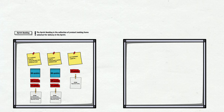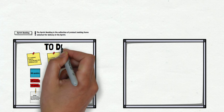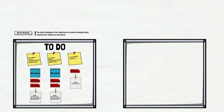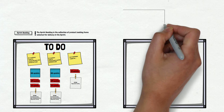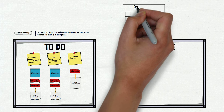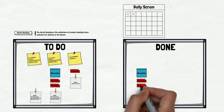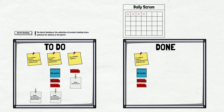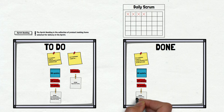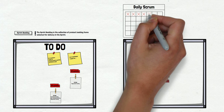The daily Scrum will look like this. The sprint backlog board is called 'to-do,' and all items we plan to deliver this iteration are on the board. The second board is for tracking daily progress — we call it 'done.' There could be a third board called 'in progress,' but we'll skip it for now. On day one we started the sprint with a long sprint planning session, selecting the items now on the to-do board. The next day people were working — items were in progress but nothing was finished. In the next two days, the main tasks of the first story were done and testing could begin. In the next three days, testing of the first item was completed and the full item was ready to be delivered.